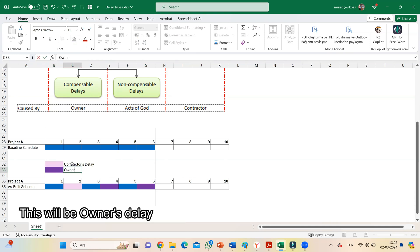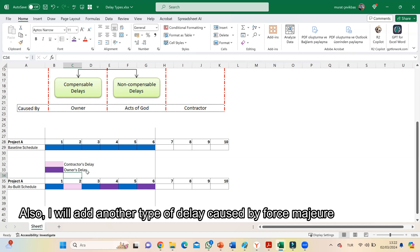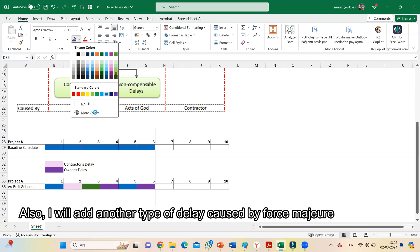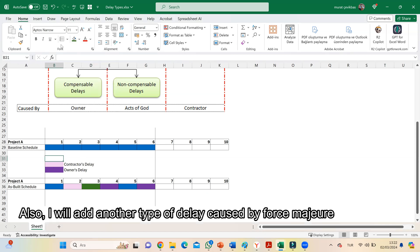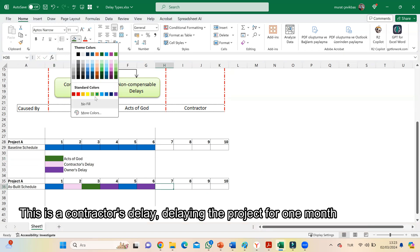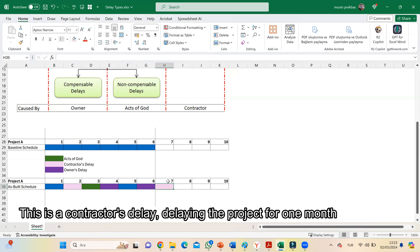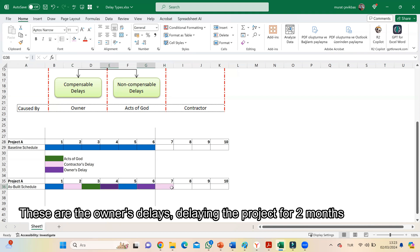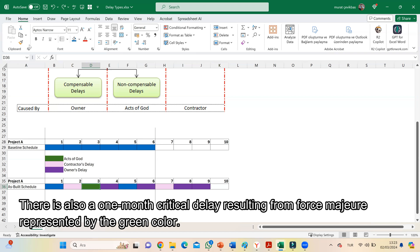Consider there is a 2-month delay resulting from the owner, represented by the purple color. I will also add another type of delay caused by force majeure. The contractor's delay delays the project for 1 month, the owner's delay delays the project for 2 months, and there is also a 1-month critical delay resulting from force majeure, represented by the green color.